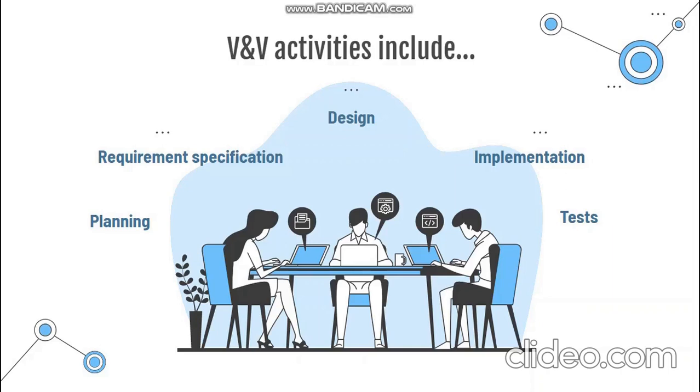And we already mentioned that the software quality assurance model is based on 3 types of data: the distribution of the defects according to their originating phase, the defect removal effectiveness according to the type of the activity and development phase, and the cost of the defect removal according to the originating development phase and the phase from which it was removed. So the software quality assurance model enables calculation of estimates for defect removal effectiveness and cost of proposals in regards to the structure of verification and validation plans.